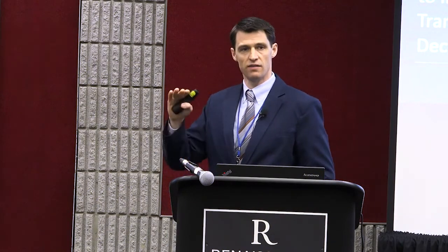However, now that we have a P6 standard, and that's going to be our master schedule, we have defined the work breakdown we want. We have defined the activity codes that we want. And certainly we're still adding to them. Nothing is locked down yet. We're in year 1 of a 4 or 5 year job. But we have a core set of dictionary items in P6.